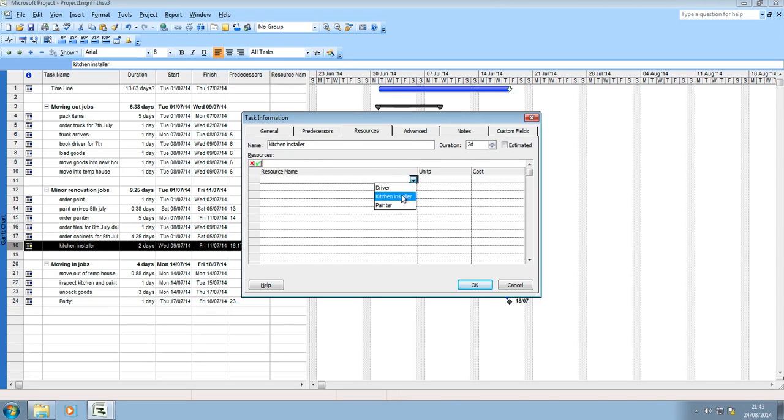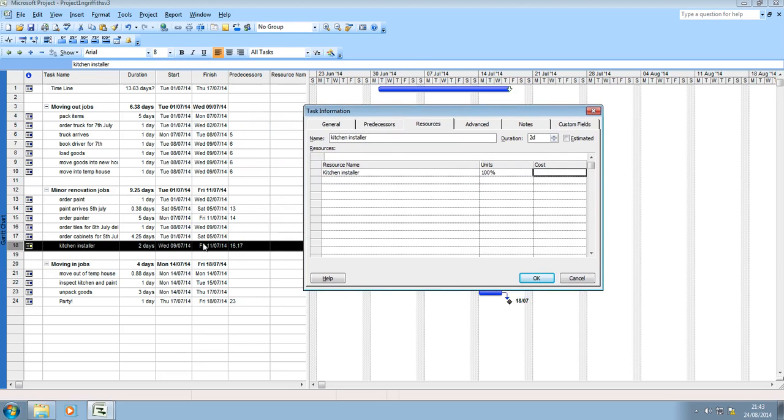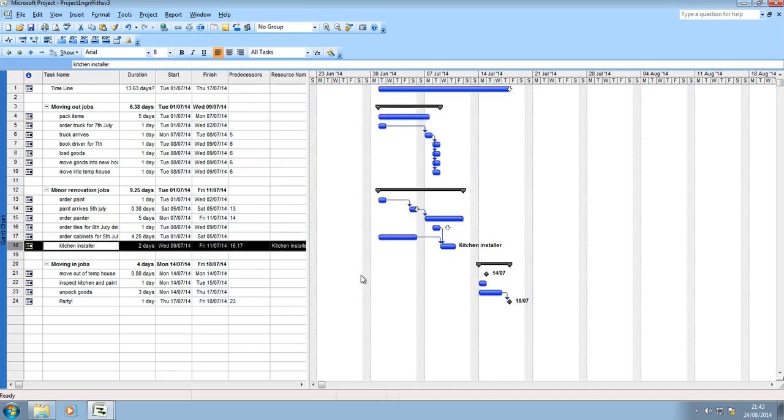So I can add them in. Now you could add a cost to him and then if it was £50 per day then it would automatically calculate the cost. So you can see now I've got kitchen installer as a resource.